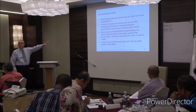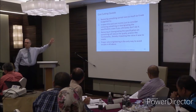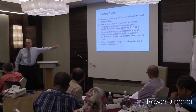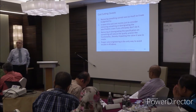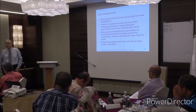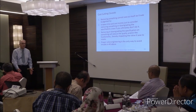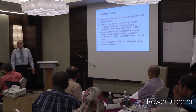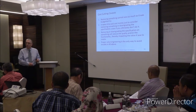And by the way, this applies to even a project that's not in trouble. Changes cost money to even think about. Removing or downgrading may impact functionality. You have to consider that. If instead of having carpet here, we were to have vinyl floor covering, that would make a difference. We could downgrade the quality of the carpet, which would have much less impact.